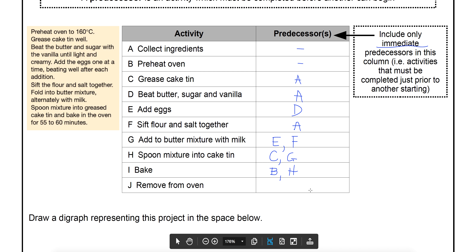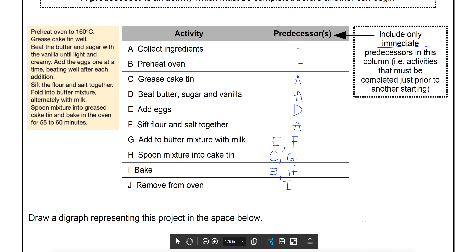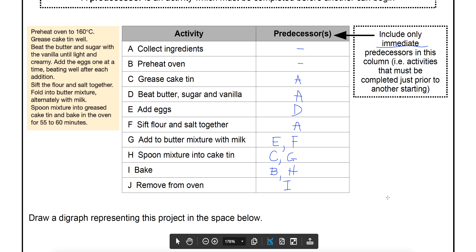These questions are never going to take you this long — this is just a longer one because I'm trying to demonstrate why things are predecessors. Removing from the oven (J) requires it to be baked first, so the only immediate predecessor is I. Generally, you're going to be given a completed table like this, or given a network from which you identify the predecessors. So filling in predecessors in a table will actually be a lot easier than what I've just done.